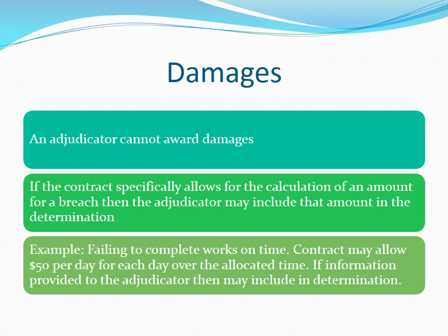it should have done. An adjudicator is only concerned with the one payment claim, not necessarily the entire obligations under the contract. An adjudicator has no judicial power and makes a determination under the security of payment legislation. An adjudicator therefore does not have the judicial power required to award damages.